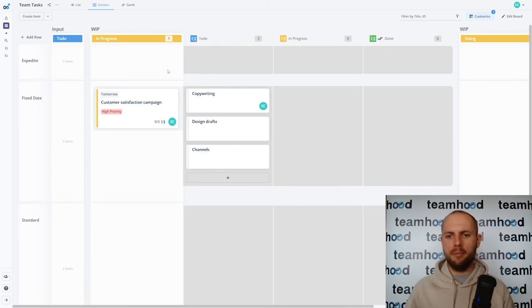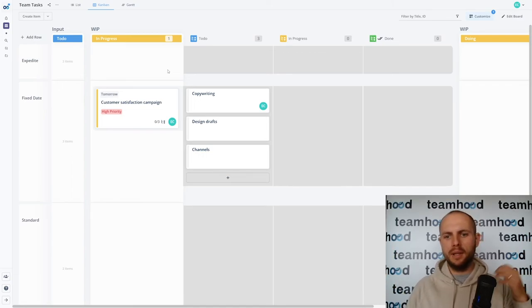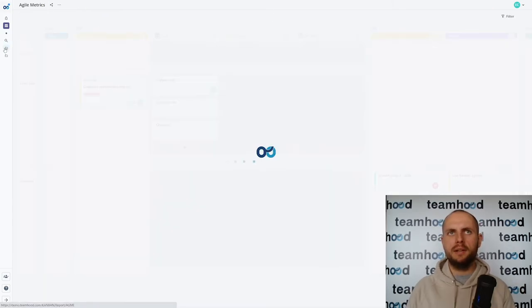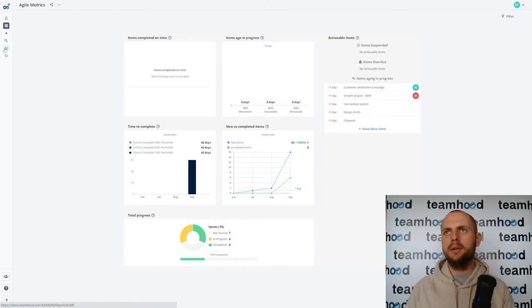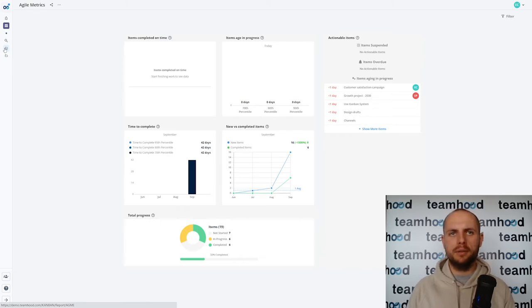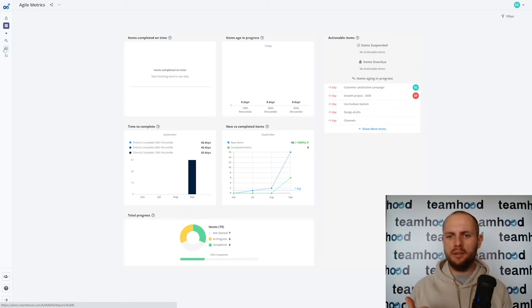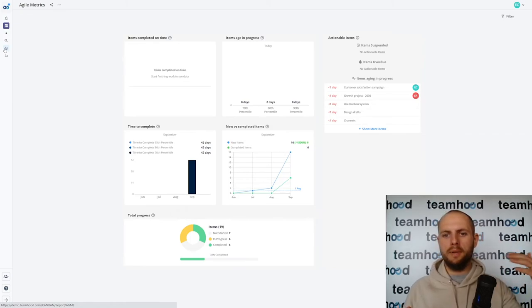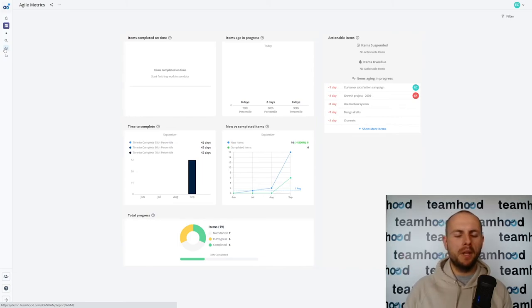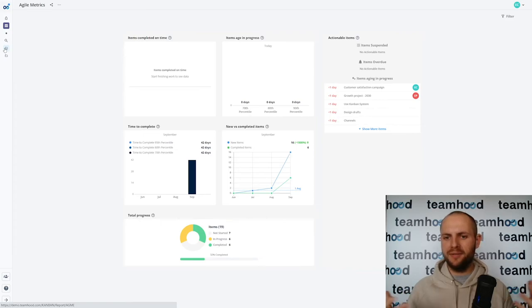This is how you design a powerful Kanban system with all the additional visual cues and two-dimensional structure. The last bit that remains are metrics and of course standard metrics like lead and cycle time in Kanban are very important. In here I don't have many data points yet but what you will be looking at usually is how much time does it take to complete on average your work items. We also are providing percentiles so you can choose what's the accuracy you want. You will be interested to see if there is like a fixed date swim lane.